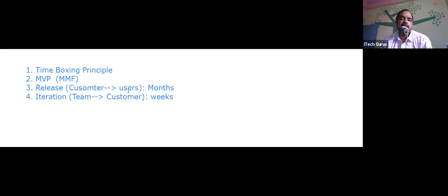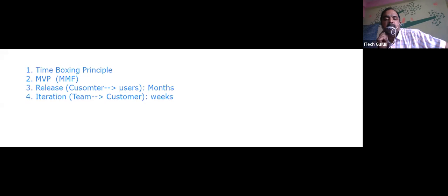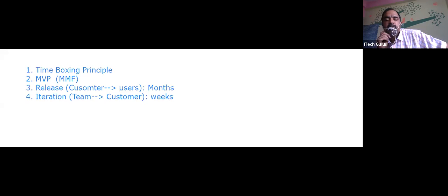Okay, what is minimal viable product? Surya. The smallest level of product that we can deliver, or the smallest feature that we can deliver to the customer. So now tell me, is minimal viable product closely related to the sprint or the release? Release. It's closely related to release. Of course, it's also related to the sprint, but closely related to release. So we need to have sprint planning, and we also need to have release planning. Yes, we need to plan that also. Based on your release planning only, you will have your sprint planning.